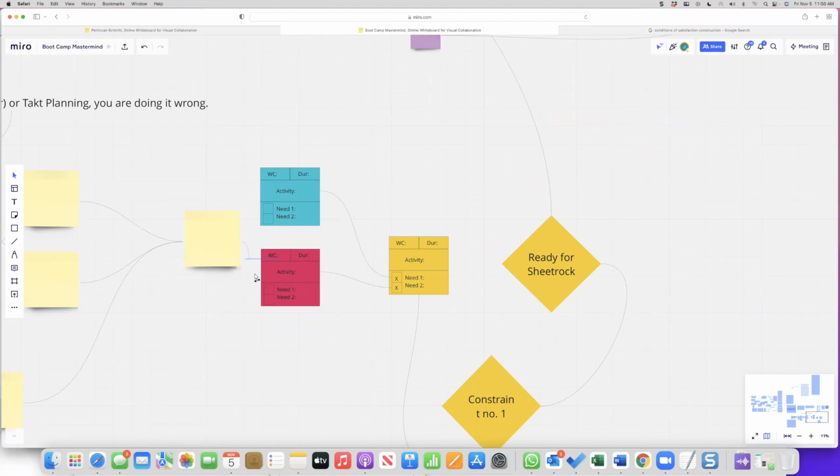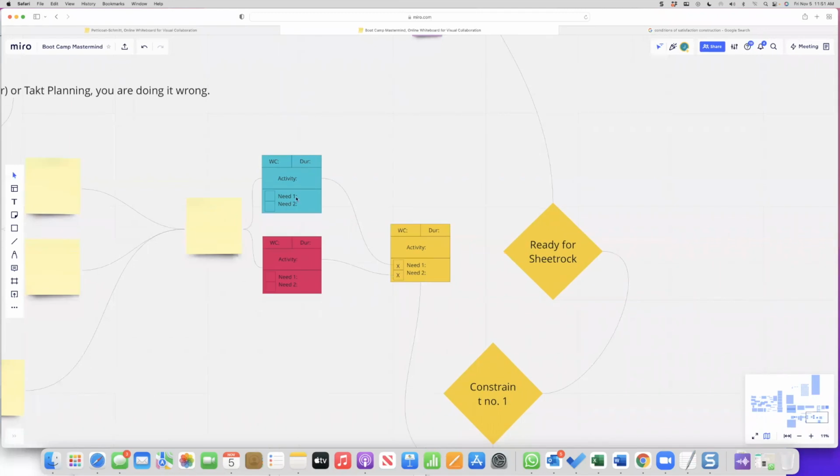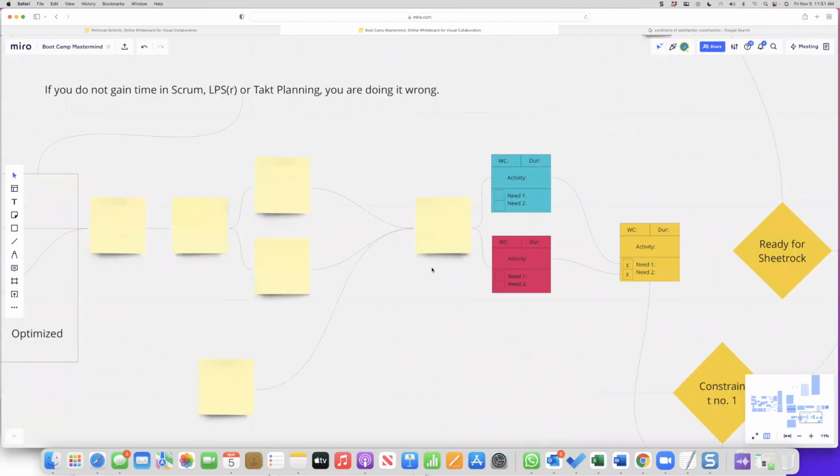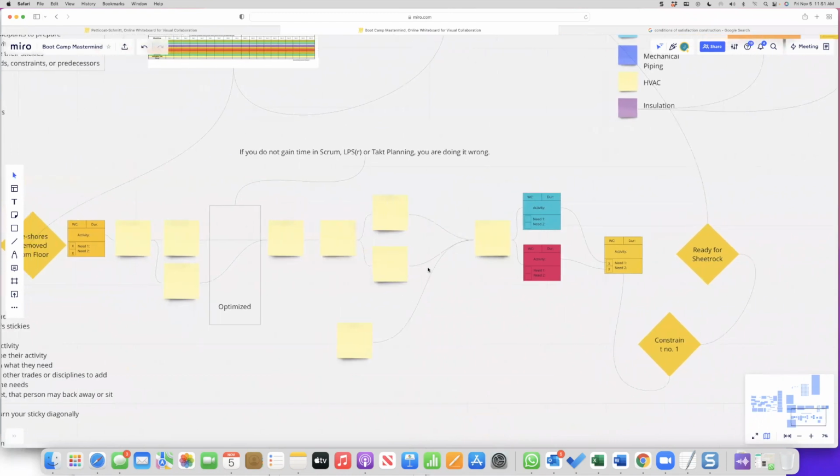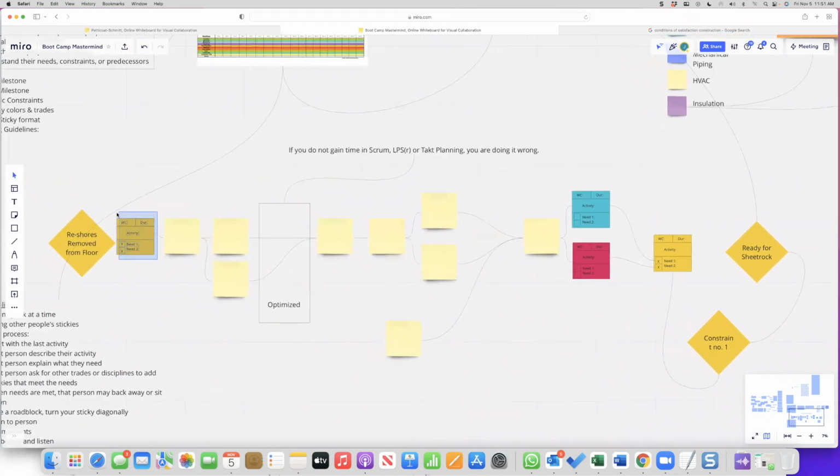What I mean by that is there's less of a chance that you finish the pull plan without actually scheduling an activity that will be crucial for a future activity, meaning it ferrets out roadblocks better. Instead of just saying, starting from left to right, this is what we're going to do, and possibly forgetting to take care of a predecessor activity for a future activity, you're going backwards, and these activities are populating based on what needs to happen. So if you have a sequence that's complete based on people's needs, there's less of a chance that you have a sequence that's incomplete.